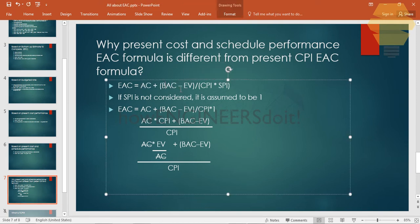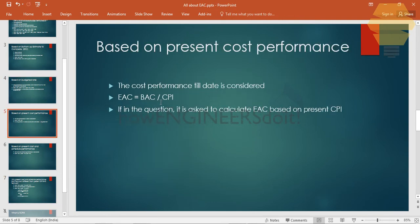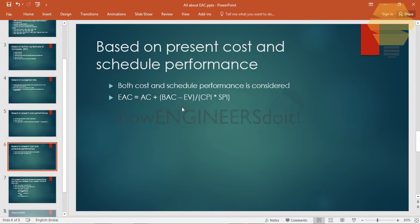The full formula is: EAC = AC + (BAC − EV) ÷ (CPI × SPI). If SPI is not considered, it's assumed to be 1. Substituting SPI = 1 gives: AC + (BAC − EV) ÷ CPI. Finding a common denominator, that becomes (AC × CPI + BAC − EV) ÷ CPI. Since CPI = EV ÷ AC, AC × CPI simplifies to EV, so EV and EV cancel out, leaving BAC ÷ CPI. That confirms the simpler formula.